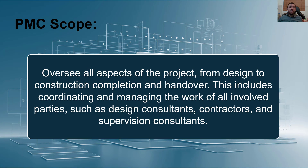We should understand our PMC scope. For example, the scope is to oversee all aspects of the project from design to construction completion and handover. This includes coordination and managing the work of all involved parties, such as design consultants, contractors, and supervision consultants. So you can see the PMC is managing the supply chain from design consultants to construction contractors to supervision consultants.